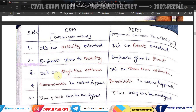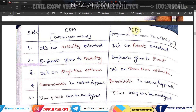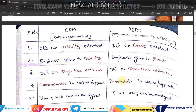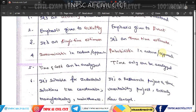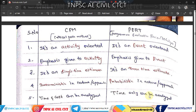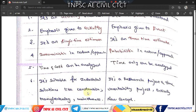CPM is activity-oriented. PERT analyzes both time and cost, whereas CPM analyzes time only. CPM is used in construction and manufacturing industries.